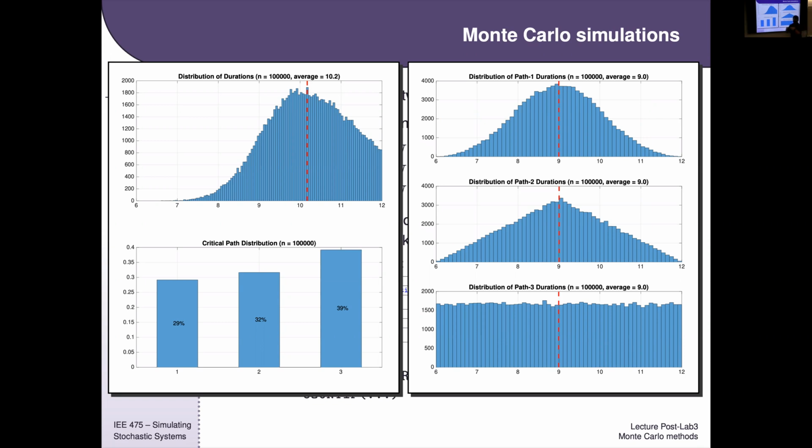So summing things together, even though the mean stayed the same, causes the tails of the distribution to pull down. And we get an even stronger version of that up here when we have 3 of these things. Even though the means all add up to 9, it's very rare. In order for me to get 6 out of the top branch that has 3 activities, I have to have all 3 activities simultaneously happen to end up running their minimum amount. So minimum plus minimum plus minimum gives me this 6, and that is extremely rare. So it just keeps pulling those tails down.